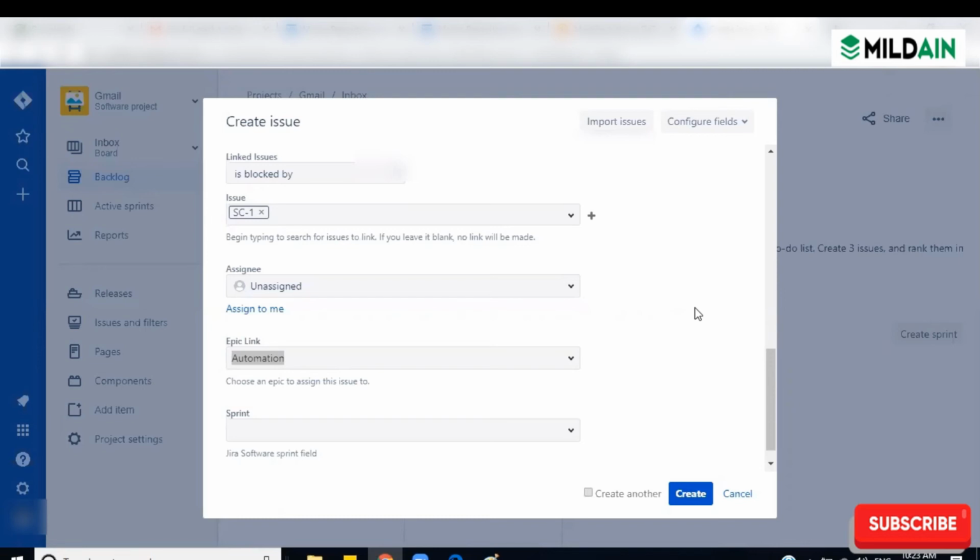Then what he will do is, the 20 stories that he decided to move by October 15th will be labeled with 1.0, right? How many stories are there in 1.0? 20 stories. And from this day to his target date, October 15th, he doesn't know how many sprints will come.